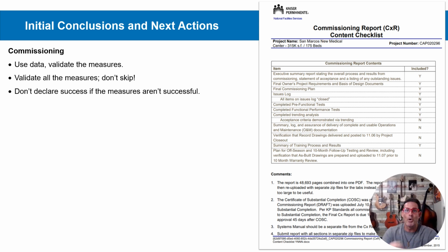And there were a lot of energy measures in the design of that hospital, something like 300 energy measures stated within the design, and a lot of them are currently unsuccessful. It takes a lot of time and a lot of programming and a lot of diligence to really get each one of those things at an optimal range before turning it over to operations and calling it successful.